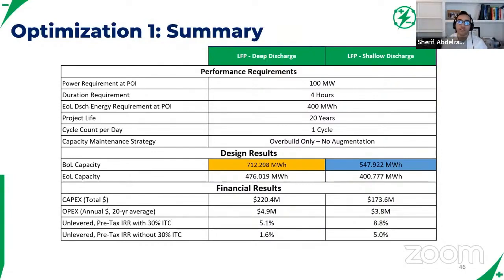Because at the end of the day, probably all the developers on this workshop are going to be very familiar with this process. When you go out and you're purchasing the battery system, you're talking to Samsung, CATL, or any of the new integrators, the first thing they're going to ask you is, can you give me a battery usage profile? How are you going to use this battery? And then they're going to give you a performance guarantee.